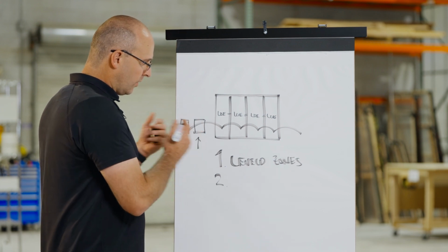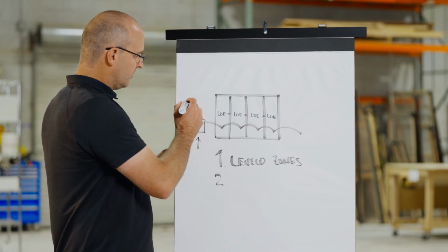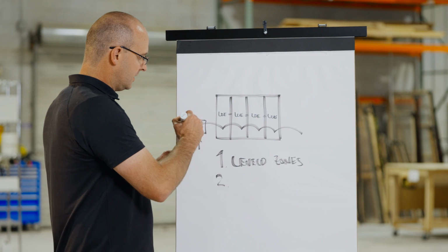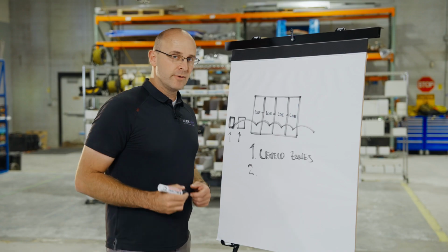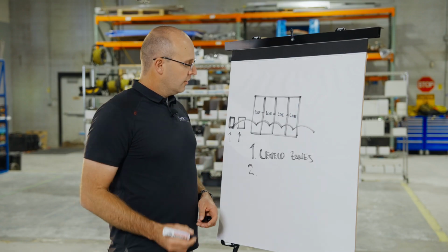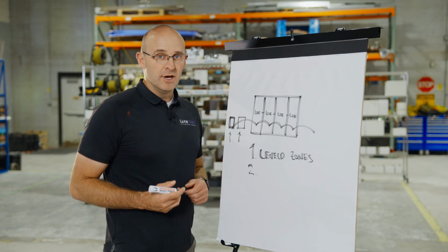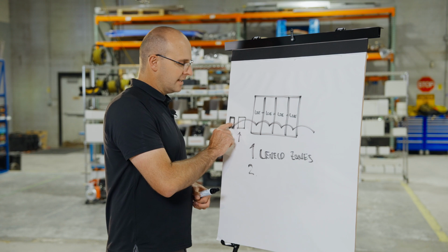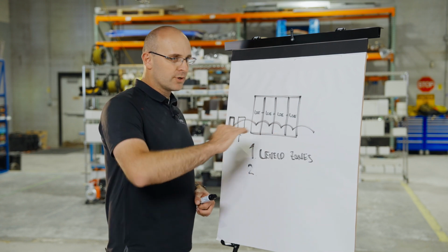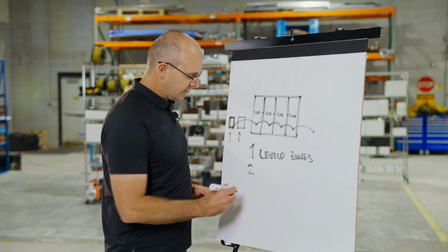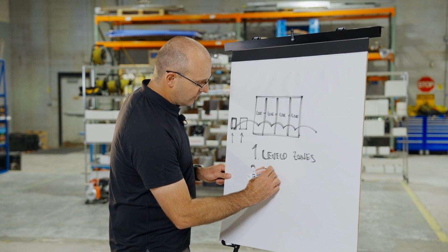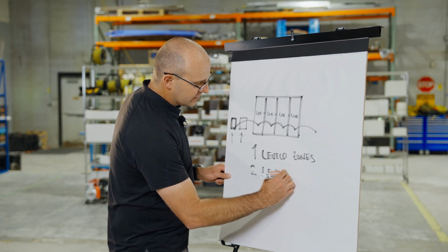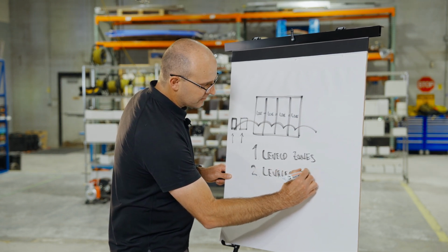It doesn't matter what trades come behind that, you will never go faster than this slowest trade. So we might break them up into 2 crews, we might add additional labor, we might do something to level the work so that each trade and each zone are pretty leveled throughout. That is how you flow. So that means that we must have leveled crews, okay?